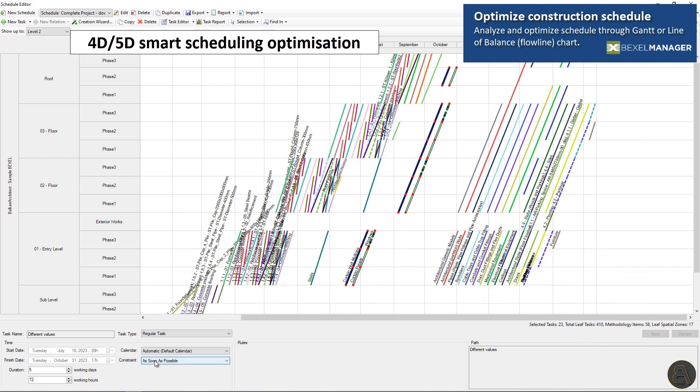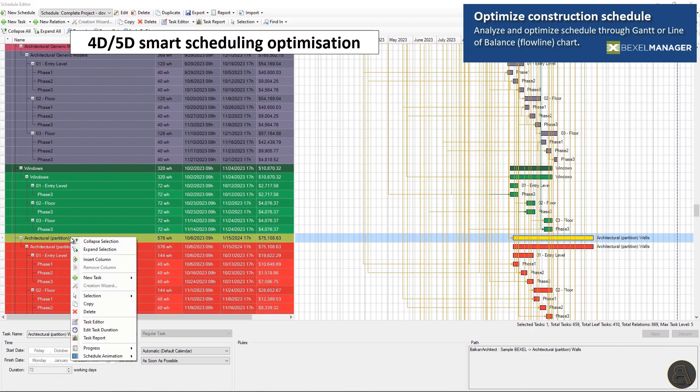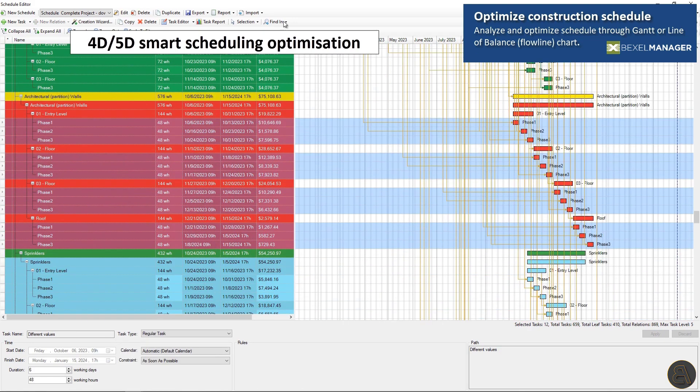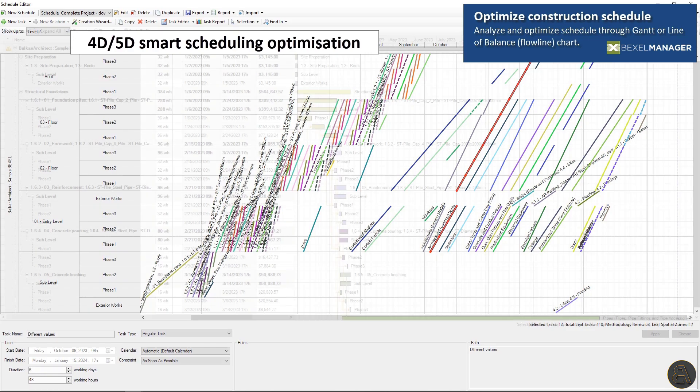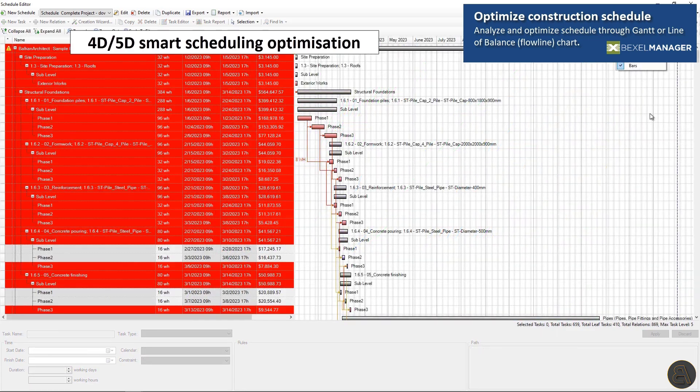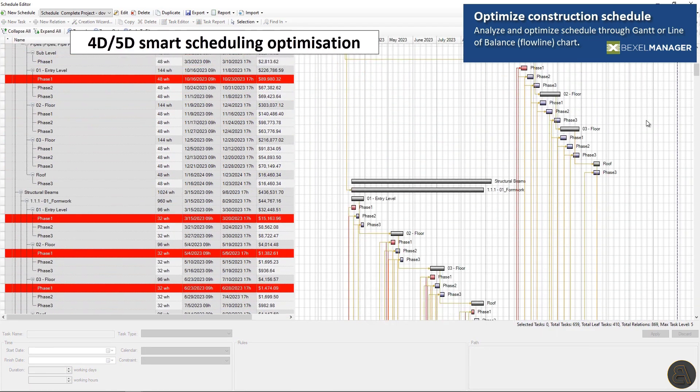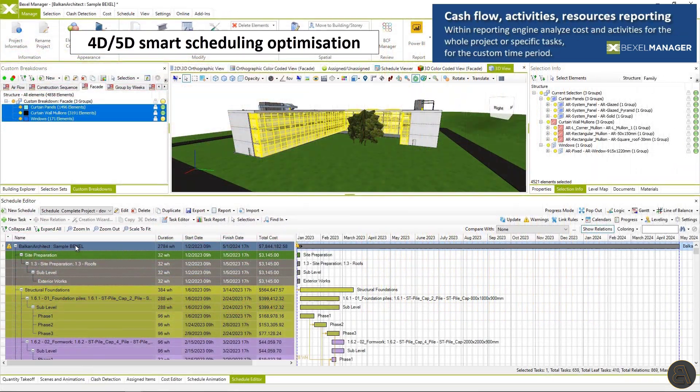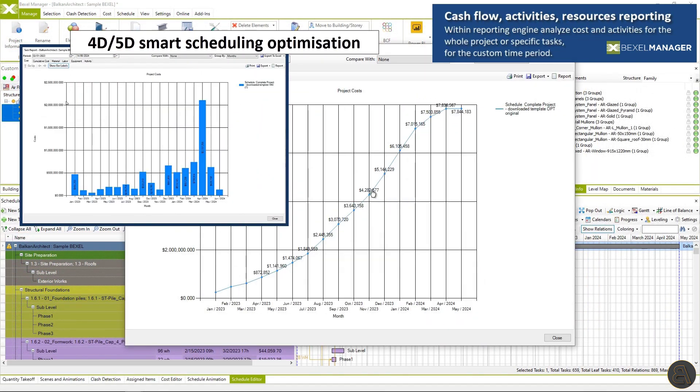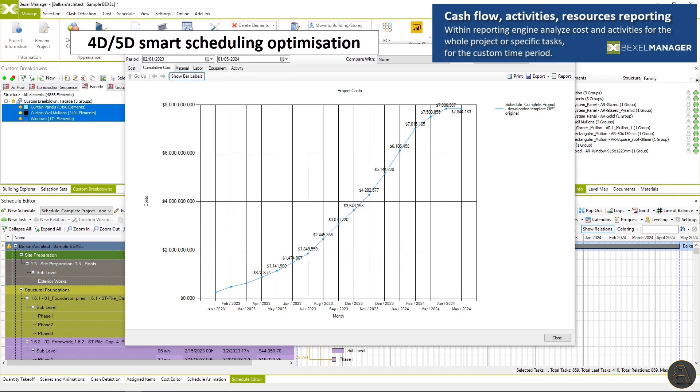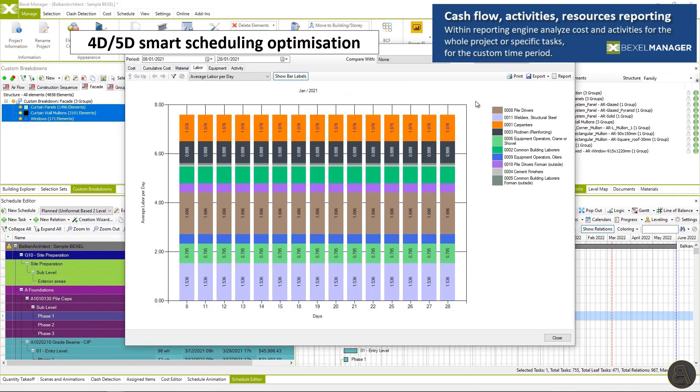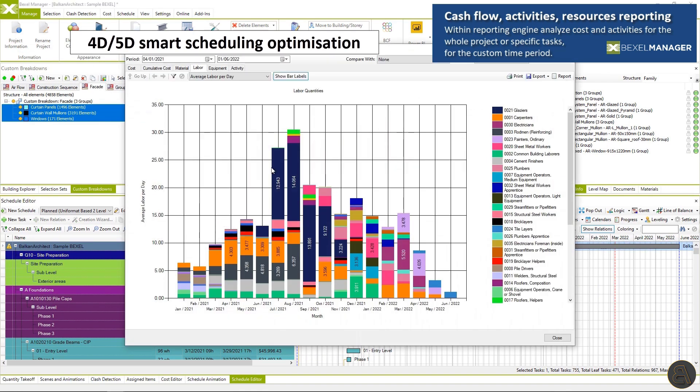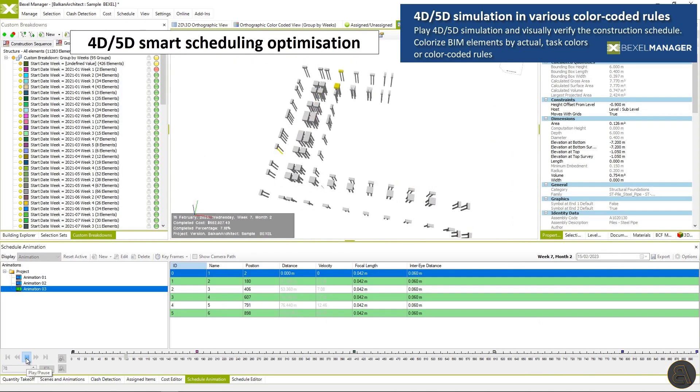Automatically select elements for fine tuning. Check and adjust their flowline, task durations, constraints, start and finish date. Check tasks on critical path using task coloring options. Within reporting engine, you can analyze costs and activities for the whole project or for specific tasks and for the custom time period.